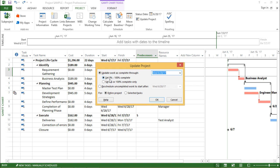Let me talk about the very first one - it says set 0 to 100% complete. That means I can select any value ranging from 0 till 100 percent. Now the next option says either I can set it for 0 or either I can set it as 100 percent completely.